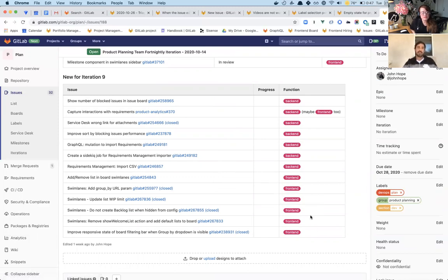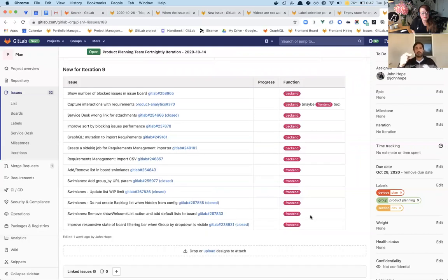On the front end side, what I want to do is get to a point where our feature issues are 2-week or iteration chunks of work. And then I can just say, so say we have 3 front-end engineers on project management. We can look for just 3 2-week or iteration chunks of work. Then that's what we'll commit to for the iteration. Does that make sense?